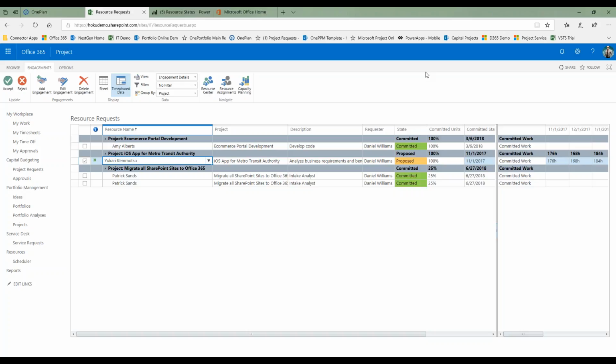And then that project manager can then, within that constraint, start assigning that resource to tasks within that particular project. The idea is it provides a negotiation process such that functional and project organizations can work together to make those things happen. Now, some people do a combination of these things in more of a rolling wave process.